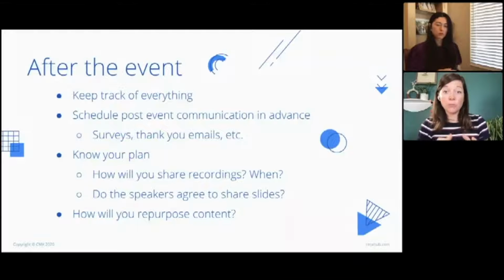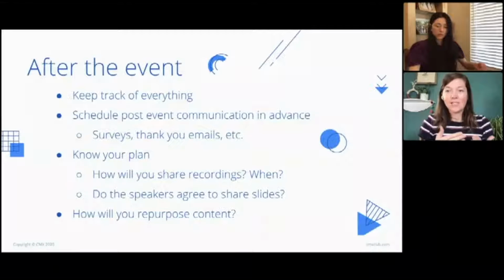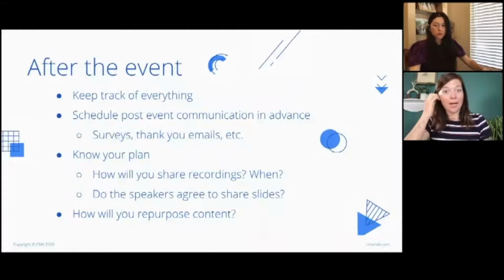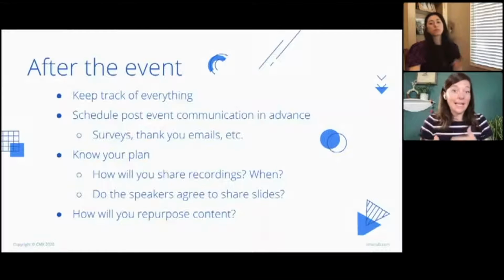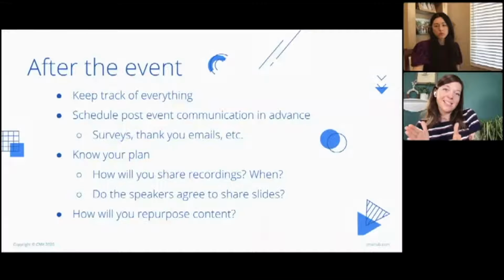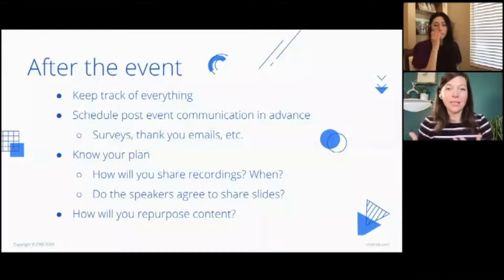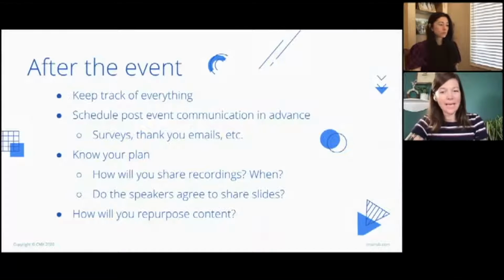So there is a huge amount of post-production work that goes into the recordings and releasing them than we actually realized in the beginning. This is one of those moments where, had we spent a little more time in the beginning planning and scheduling the post-event stuff, it might have been a little bit easier. So again, I'll say it once, I'll say it again, just set yourself up for success.